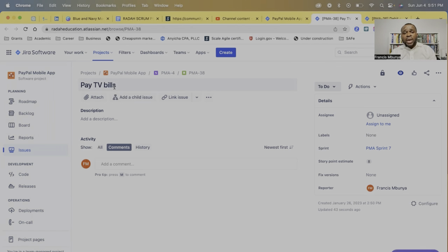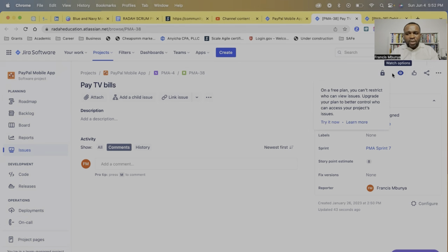And someone will say, oh, okay, I think we can split the back end and the front end work. Or someone can say we can build the back end work, or we can build the infrastructure work separately, and then connect the APIs for the payment separately. So in that case, this story was 8. We want to split this story into 2. So how do we split the story into 2?